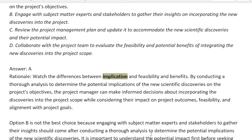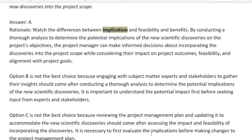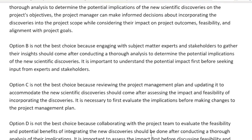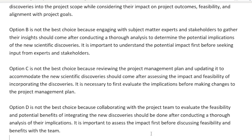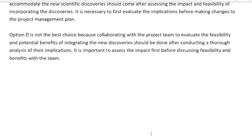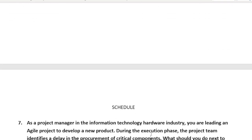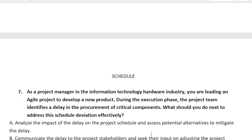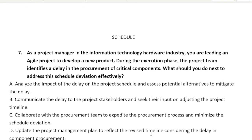Option B — engage with the SMEs — is not the best choice; that should come after conducting a thorough analysis. Option C — reviewing and updating the project management plan — should come after assessing the impact; it's necessary to first evaluate the implications. Option D — collaborating with the project team to evaluate feasibility and potential benefits — should be done after conducting a thorough analysis of the implications. It's subtle and very nuanced, but you always want to think about the implication before looking at benefits and feasibility. With that, we are done with today's episode. In the next part of our series we will be going into the schedule area.